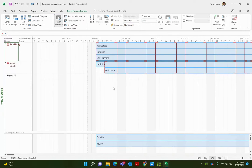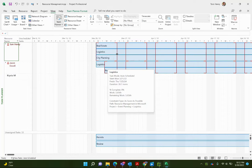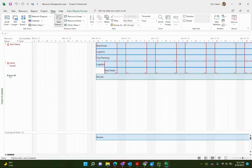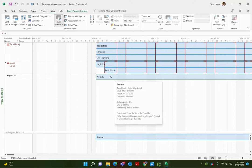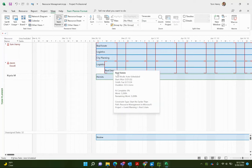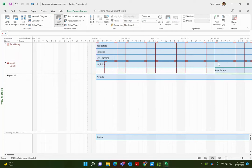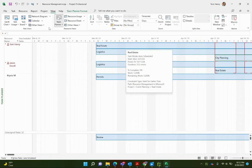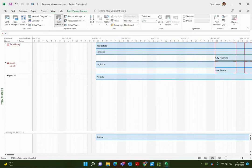Next is the team planner — I have a whole video dedicated to this. It's a nice view to see what's going on with all the tasks and resources and what they're working on. On the left-hand side you see the resource names. Krista hasn't got any jobs, so we can add 'Permitting' to her list — boom, she's assigned to that task. Jason has some overlap of tasks; you can drag them around to get a better forecast of what's going on.